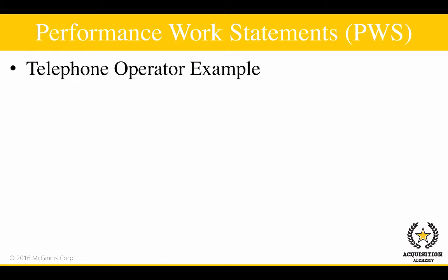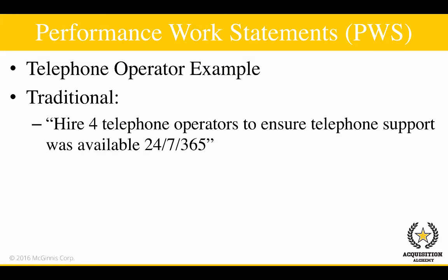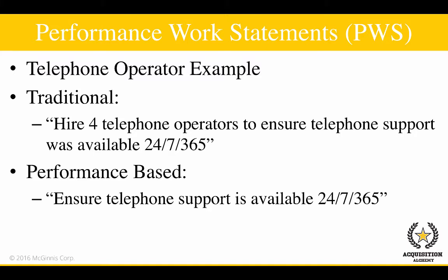For example, a traditional performance work statement would have directed a contractor to hire 4 telephone operators to ensure telephone support was available 24/7, 365. However, a performance-based performance work statement requires the contractor to ensure telephone support is available 24/7, 365. This leaves the how-to up to the contractor and requires only that the telephones be supported 24 hours a day.